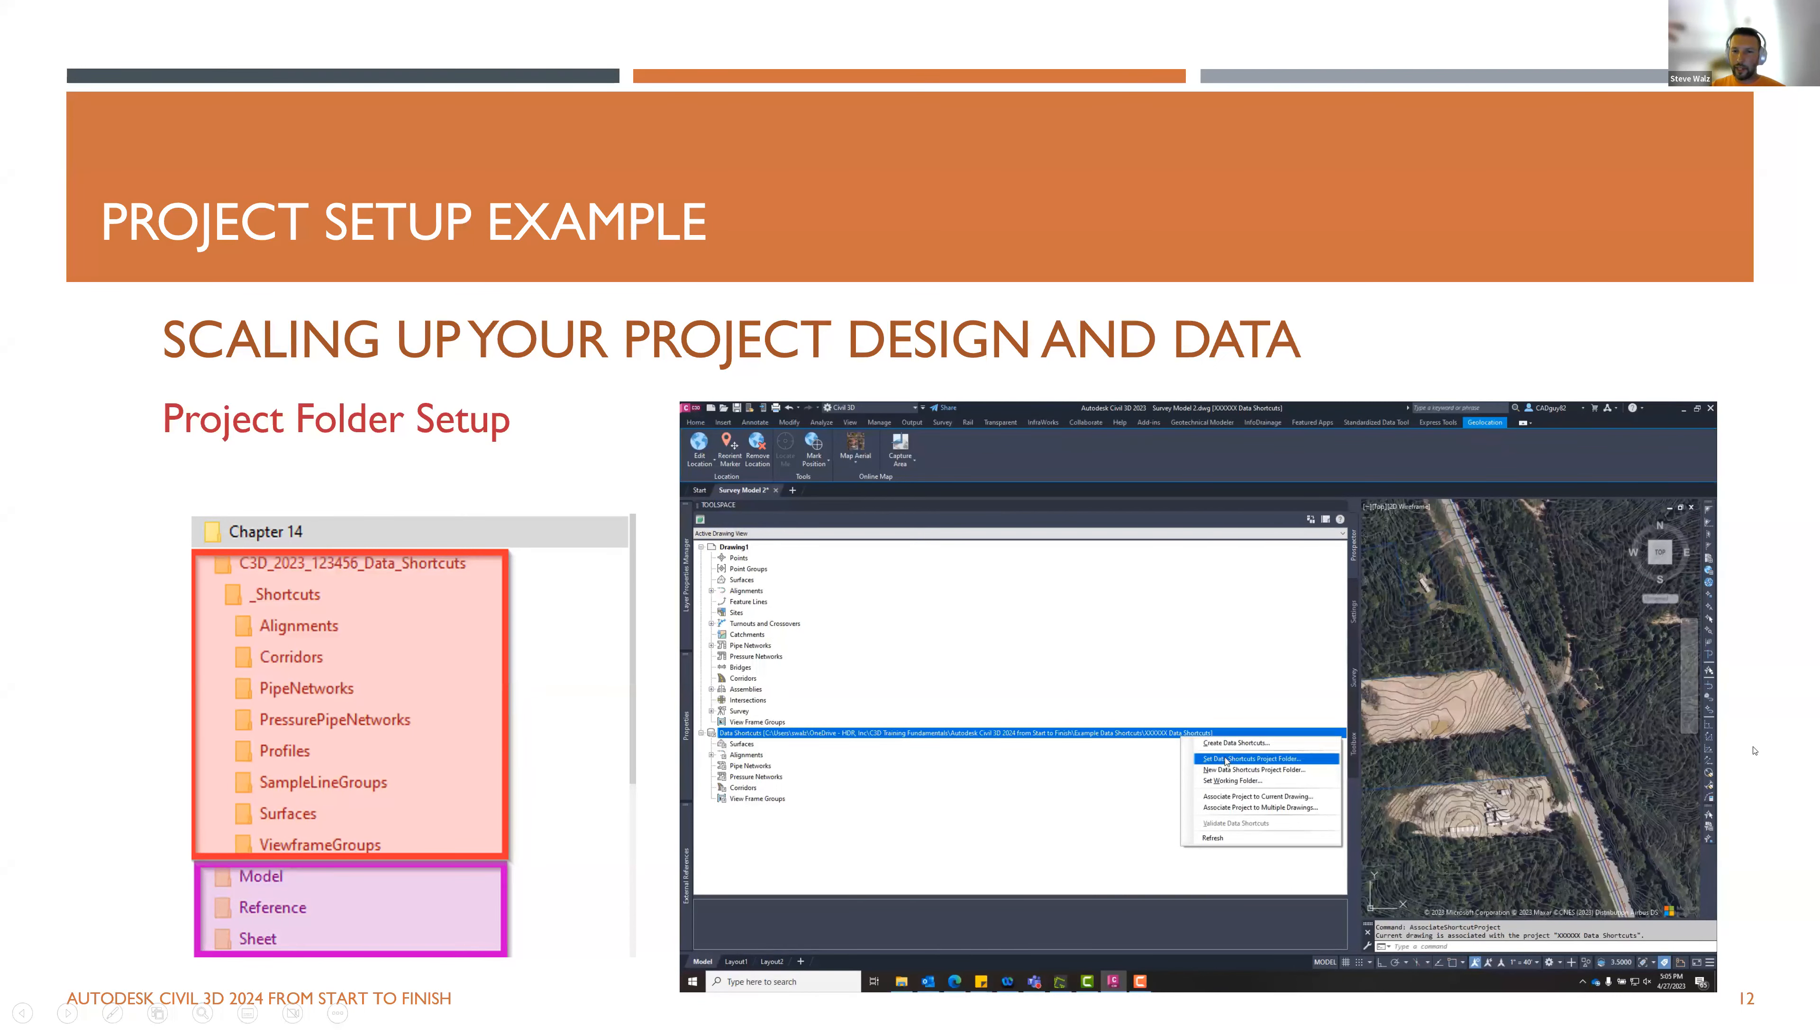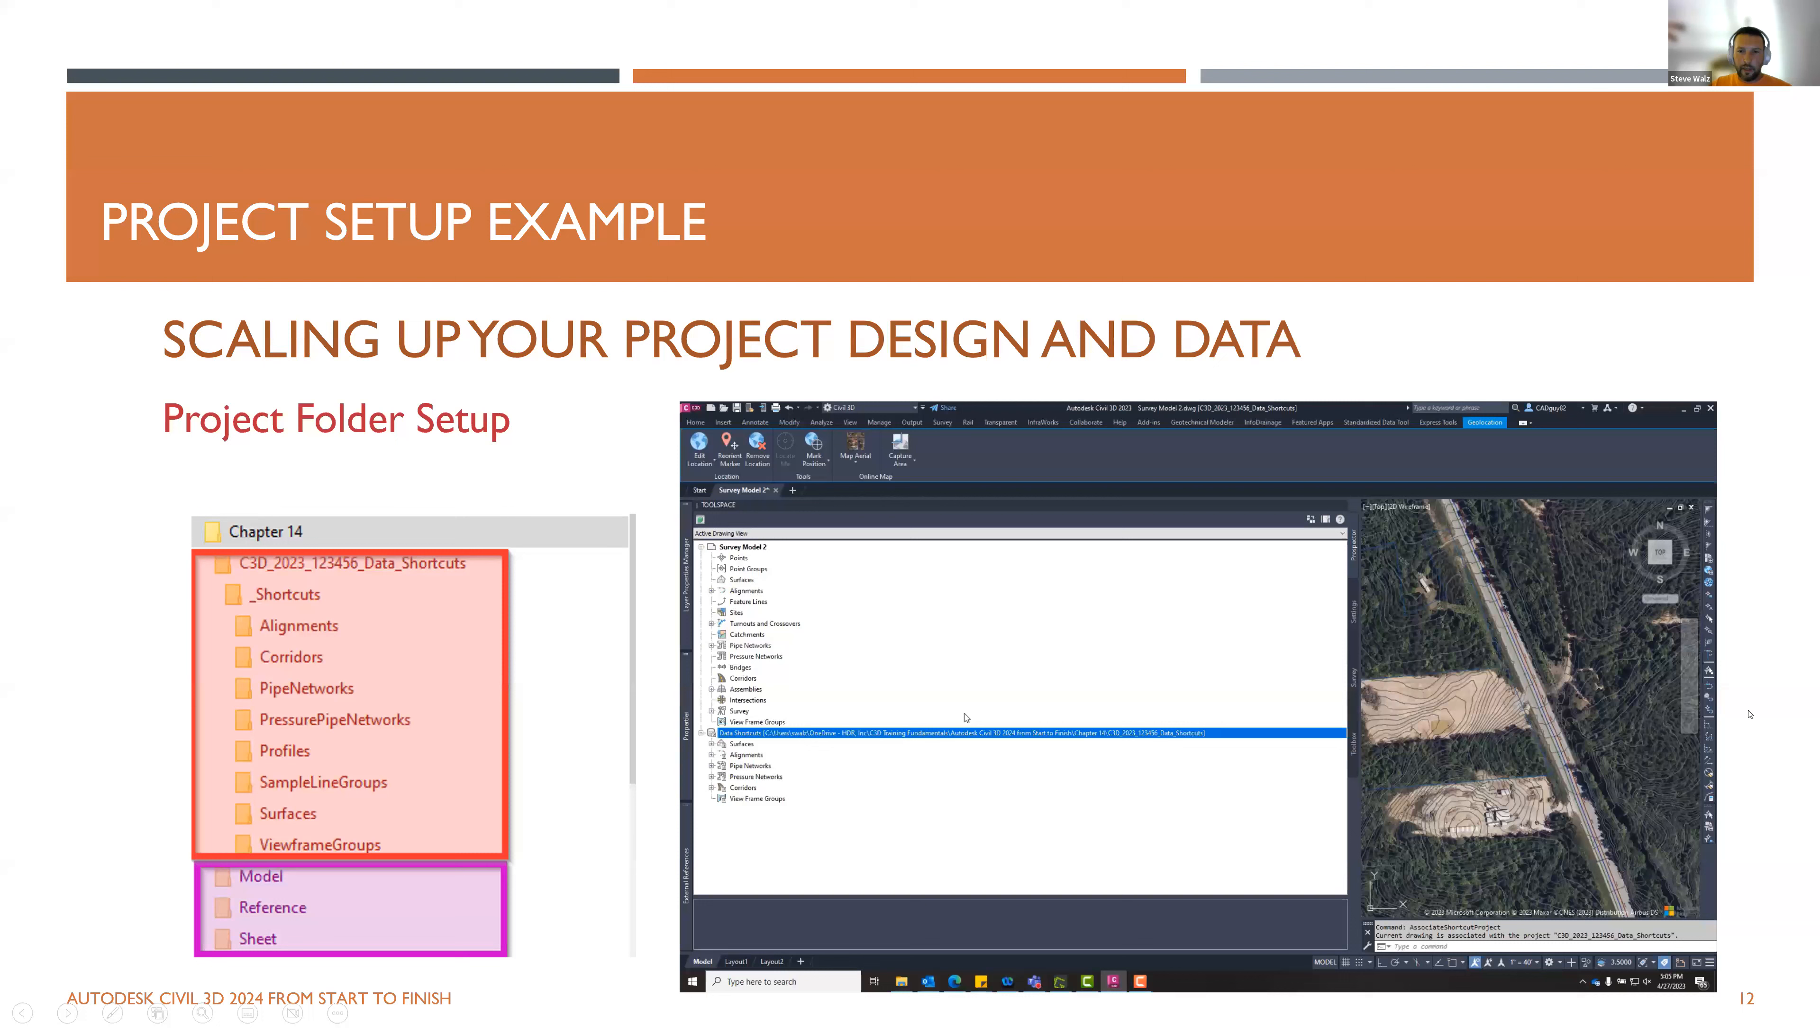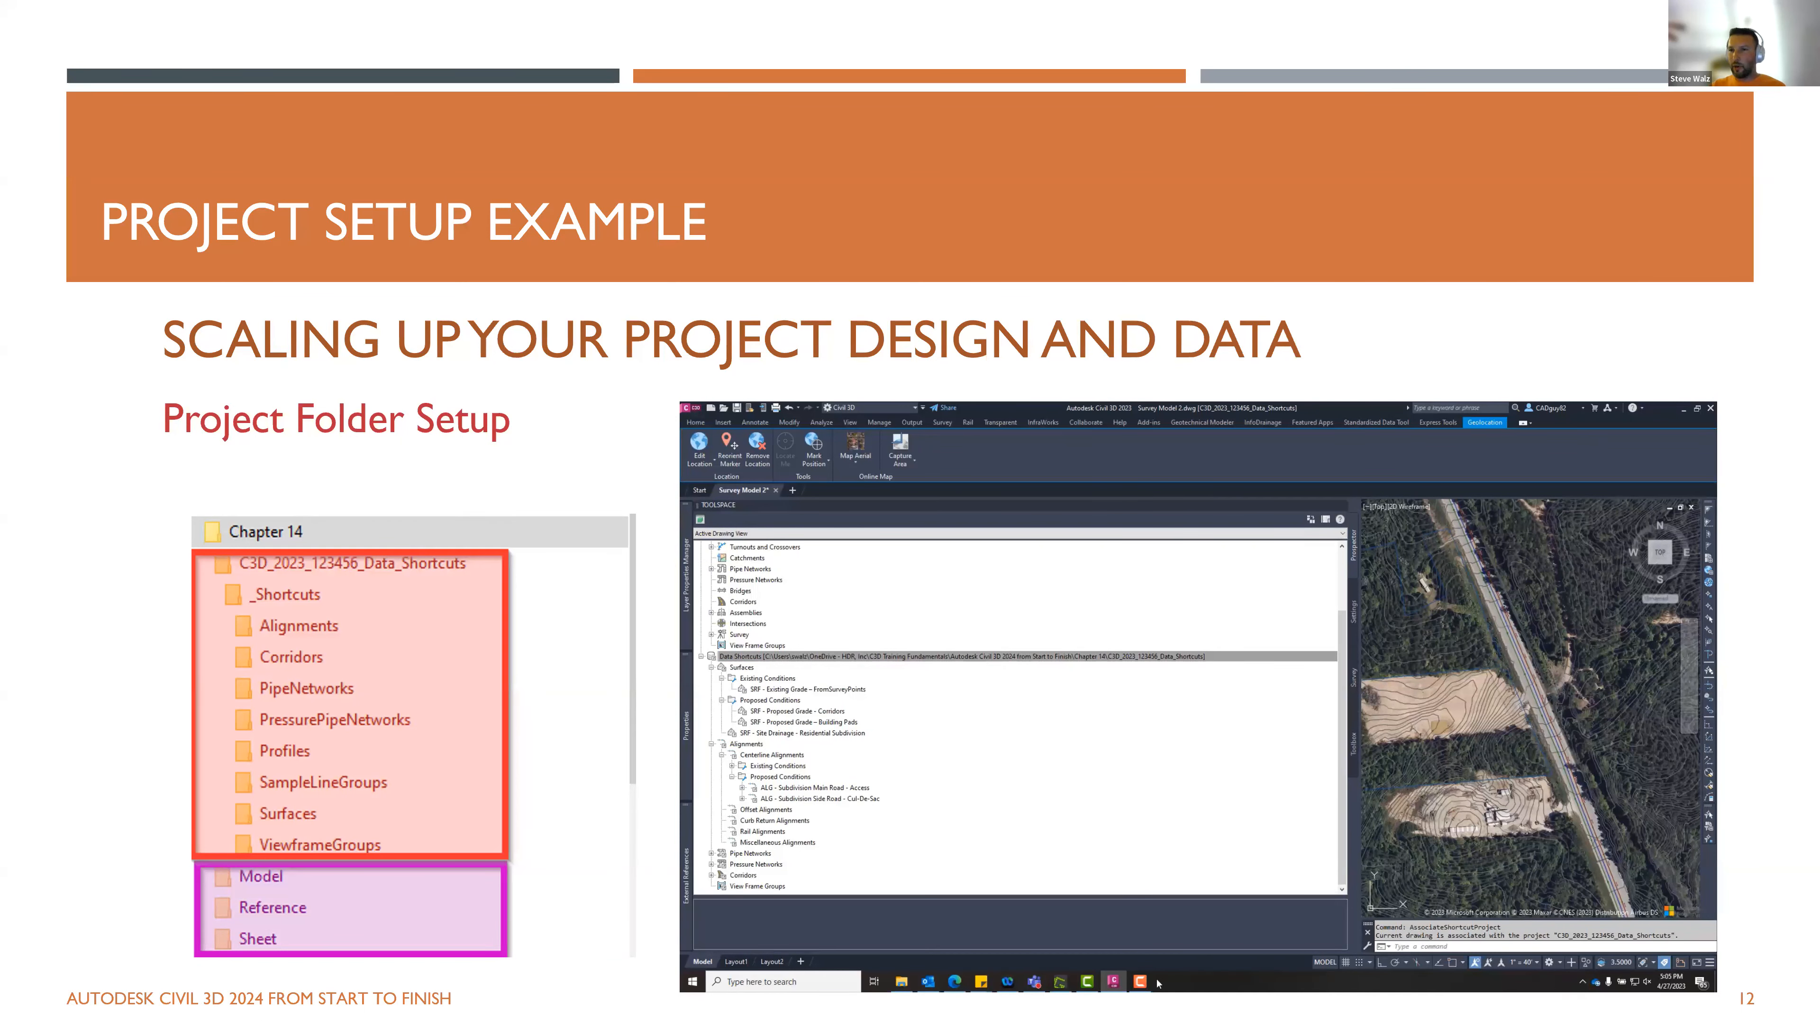And then we're going to need to create a new data shortcut project folder. And again, all these steps are definitely detailed in our book, goes through the process of creating these data sets from scratch. We'll give it a temporary name for now. And as you can see that link shows up now and then you're going to want to associate it with your drawing this way. The next time you open this file, it remembers that it's associated with this particular data shortcut project and you won't have to reset that moving forward. So if we go back here and set the working folder again to our actual data set, you'll see all the components, the surfaces, alignments, pipe networks, etc., populate underneath that. We'll go ahead and associate that to the current drawing just to make sure that the next time we open it, it's associated. And then as I expand these, you can see the individual components that are available within our data set that we have progressed through up to chapter 14. So quick process of how we can make the project design scalable and be able to parse things out so additional project team members, whether they're designers or engineers, can get into the program and continue to progress the design.